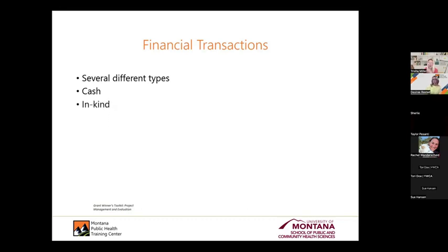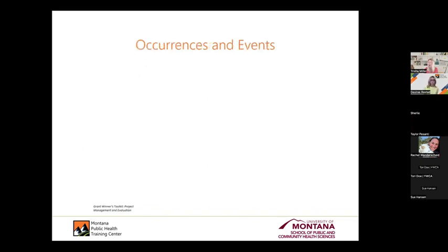In kind, cash, you for sure want to make the differences between these different kinds of things. You want to say, okay, here are the financial transactions. Here's what we spend monthly. This is back to that direct versus indirect. Is it fixed, mixed, variable, step costs? Is it cash that somebody's donating? Is it in-kind, like that library space? What are the project activities that you've spent on? What about salaries?